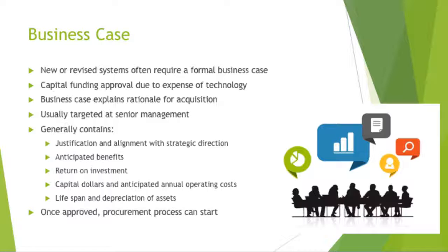We're going to look at what a few organizations suggest as content for the business case. In general, they will contain a justification for the project, what you want to do, and information on how it aligns with the strategic direction of the organization, what the anticipated benefits are, what the return on investment or other financial measures will be. Capital dollars, expenses, and anticipated annual operating costs must be forecast.